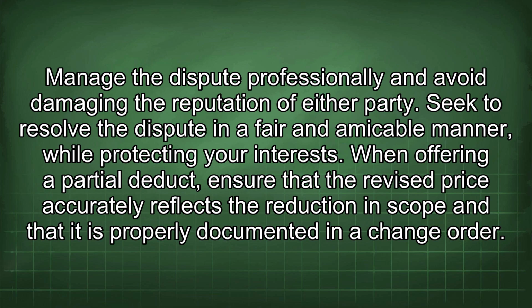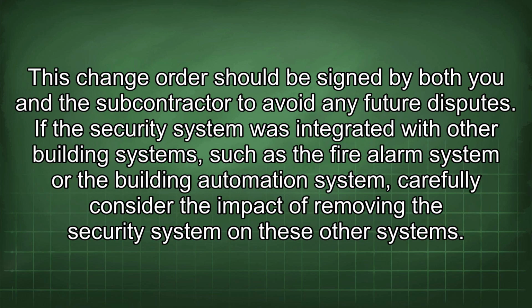When offering a partial deduct, ensure that the revised price accurately reflects the reduction in scope and that it is properly documented in a change order. This change order should be signed by both you and the subcontractor to avoid any future disputes.